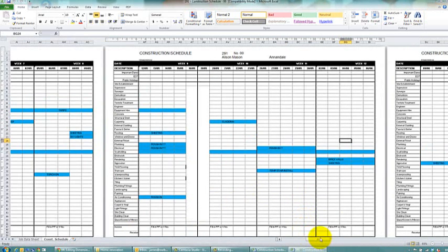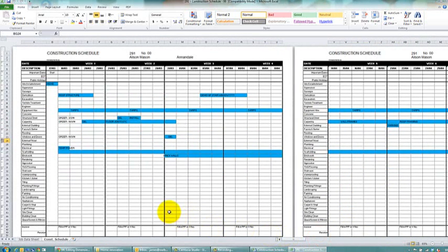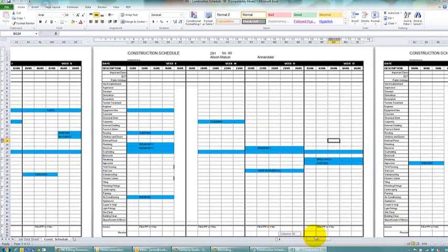You'll see here that it's been filled out with all the resources that are going to take place. So from the very start of the job, moving some stuff around, we've then got the demolition of the roof structure. During that time we're going to have tarps set up above the first floor addition. We're also going to have, after the roof's been demolished, carpenters come in. We'll have scaffold set up over the property during that time. And then after the carpentry's been done, we'll have bricklayers come in, and so on and so on. And that basically goes right through for the duration of the job.